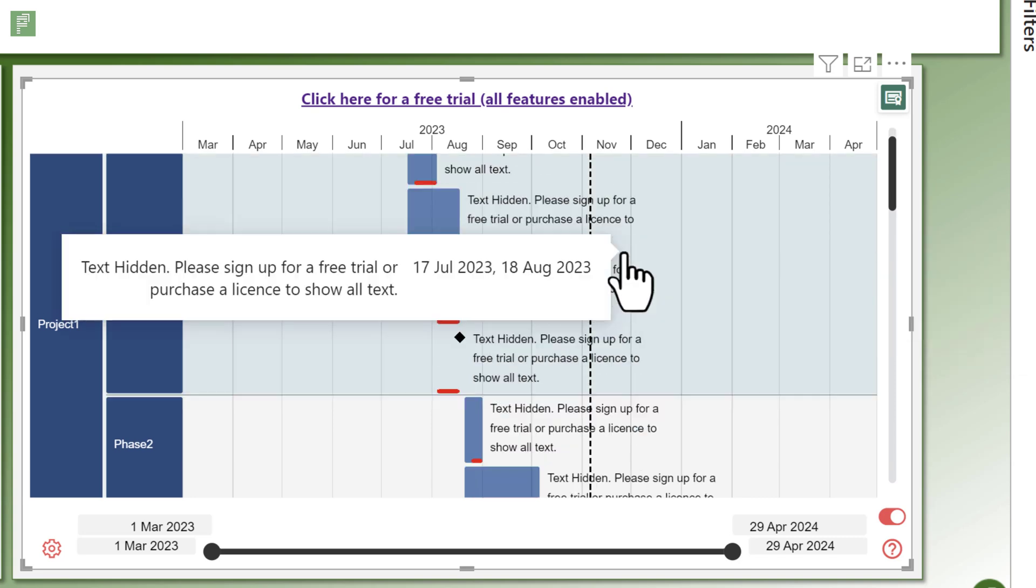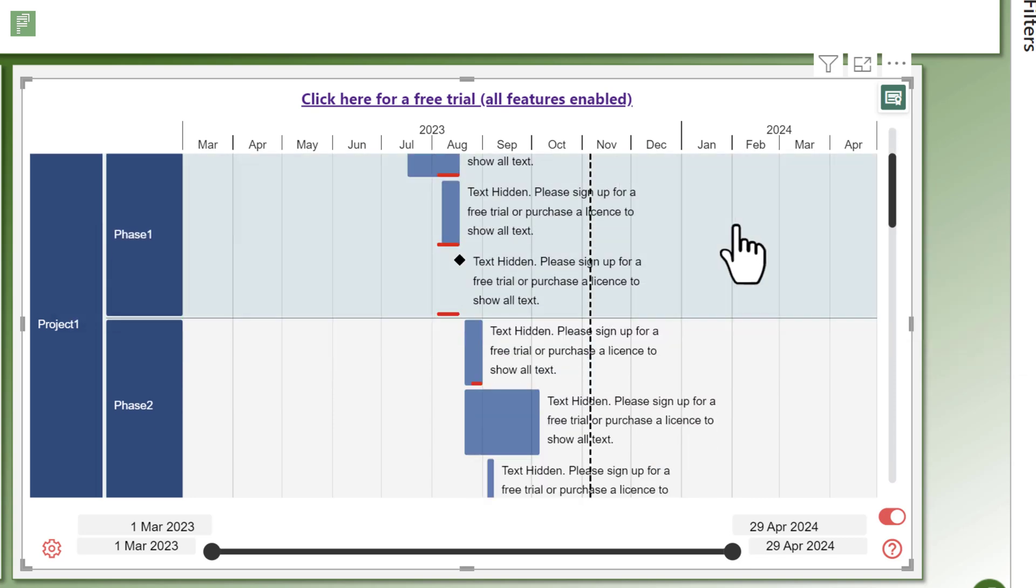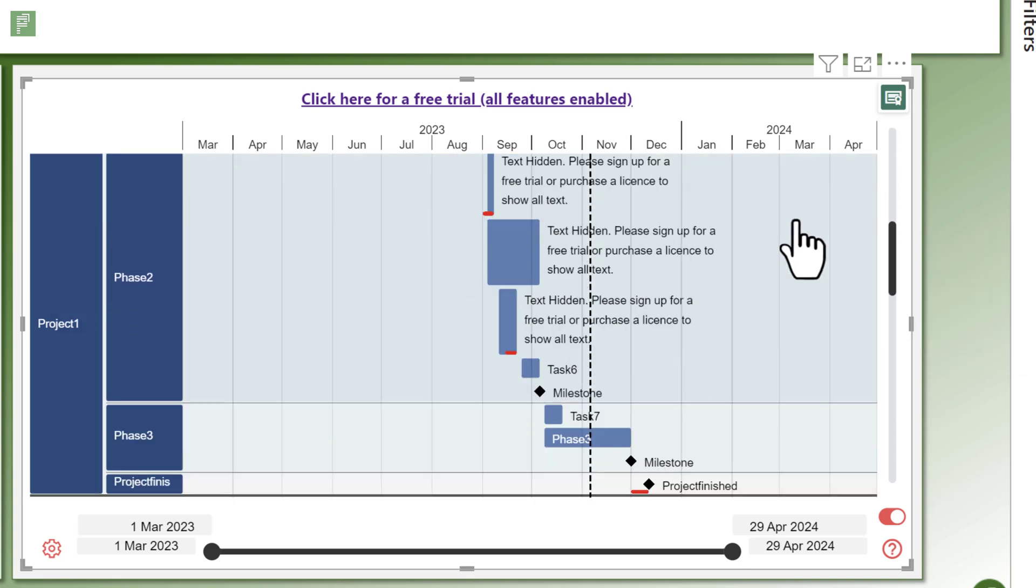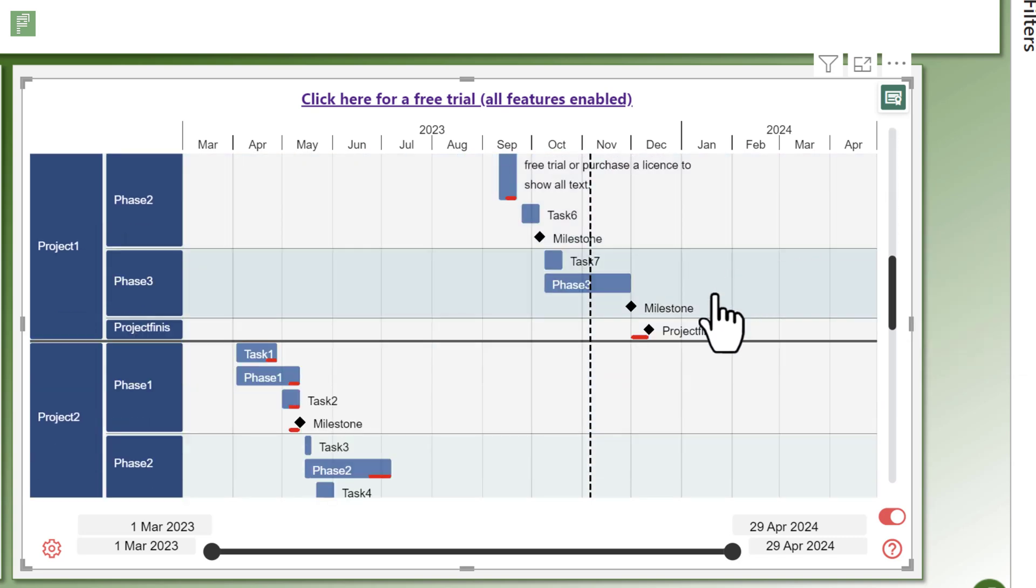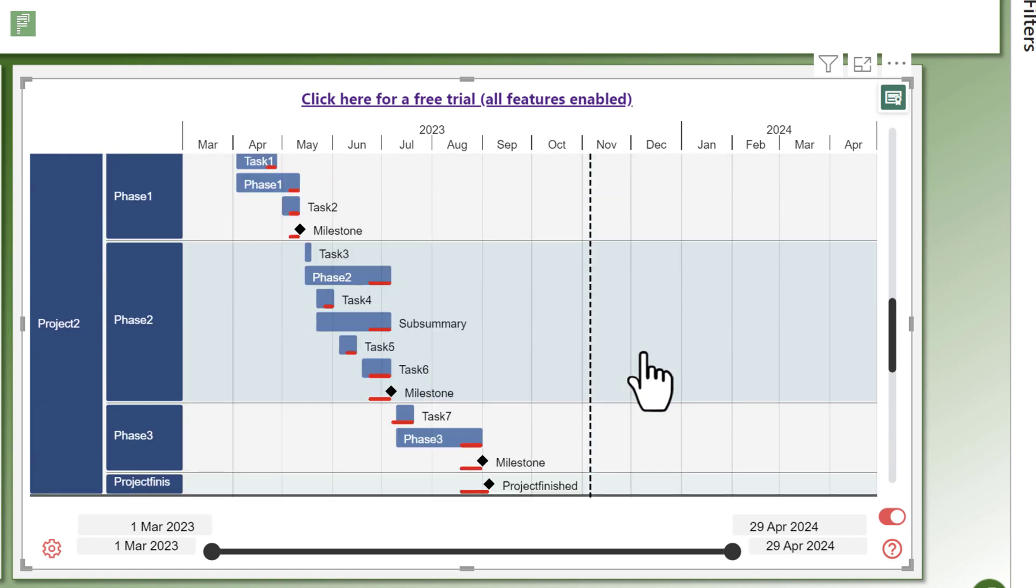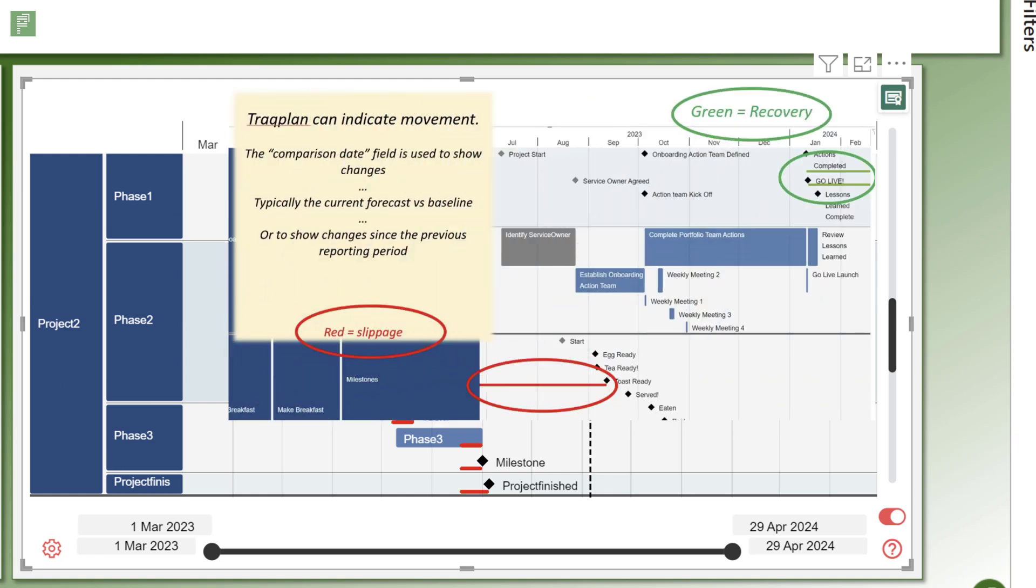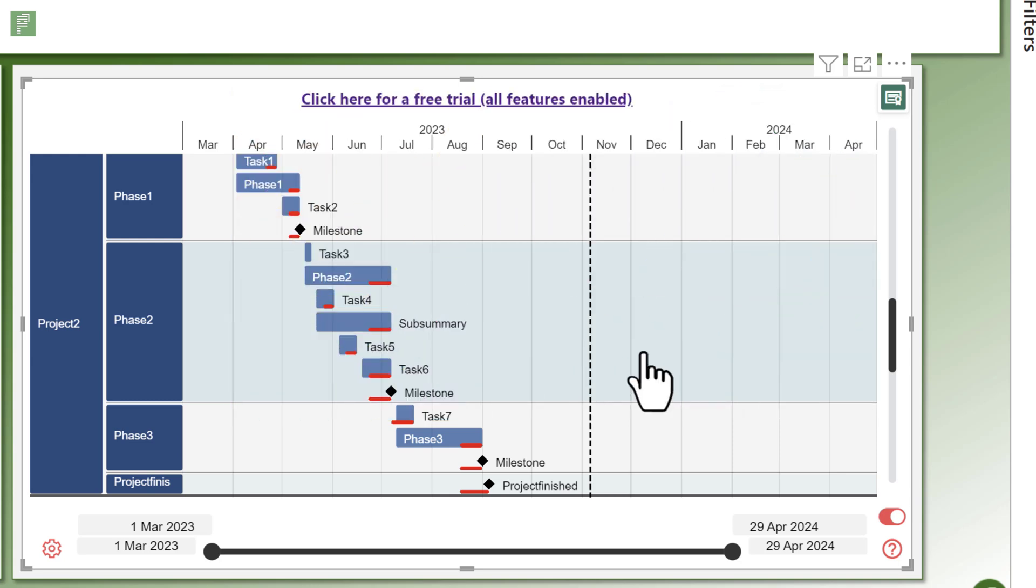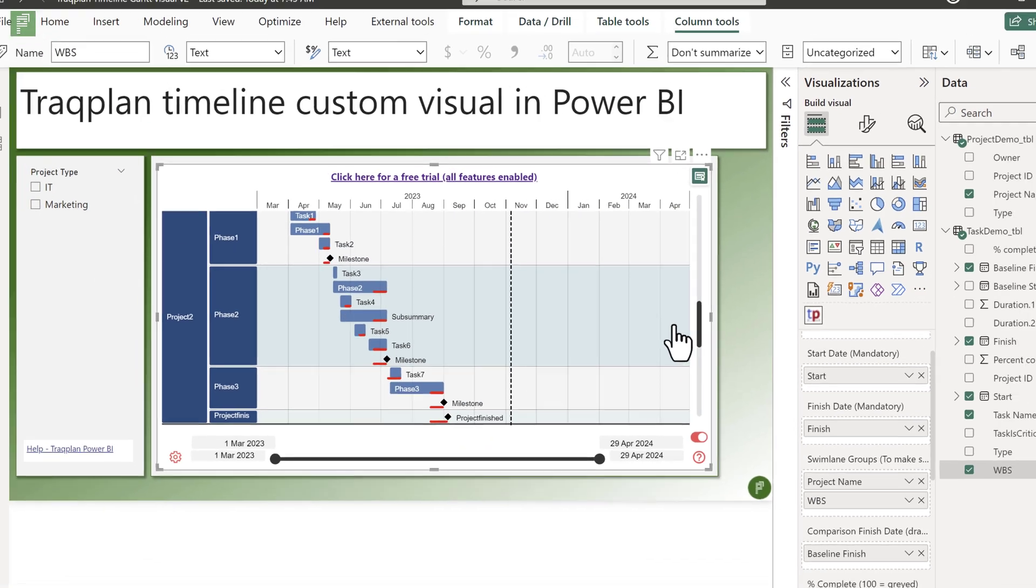And if we move down a bit to text that actually is showing here, you see that we have an issue. And currently, everything is red because everything is running behind. But there is also an option to show green values for where you are ahead of your baseline. Very nice and powerful little feature within the TrackPlan Timeline. I really enjoyed this.